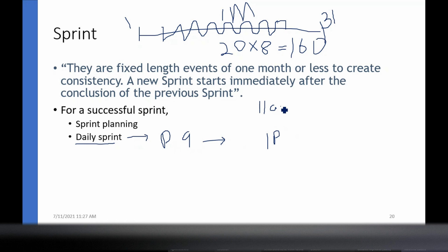Every day we take 15 minutes to discuss the status of our current sprint, the allocated work, the percentage. What you have to do is you have to stand up. It's a stand up. You have to tell, my task is this, and I have completed this much percentage.